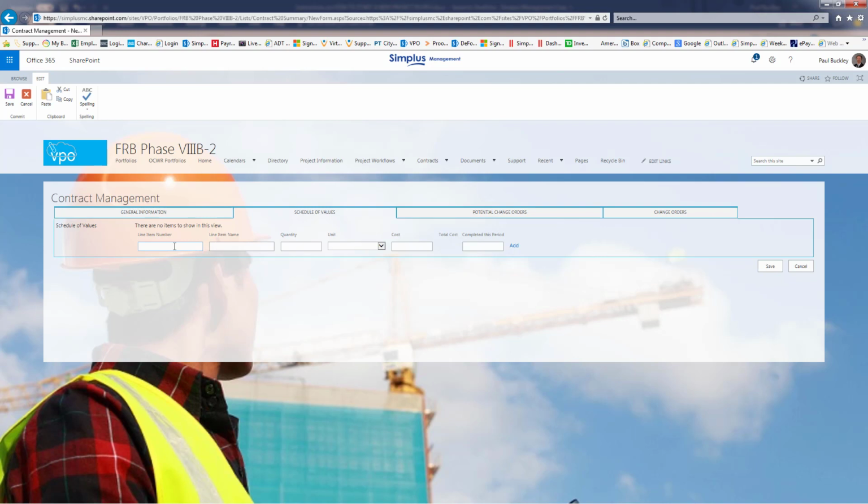One important note to keep in mind is that in the first 10 or so line items, because this is not considered numerical from a programming standpoint, please put a 0 in front of 01, 02, 03, all the way through 09, or your numbering for your line items will be thrown off.